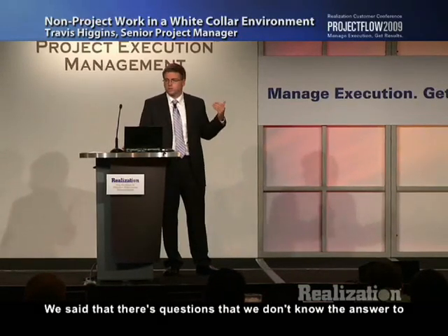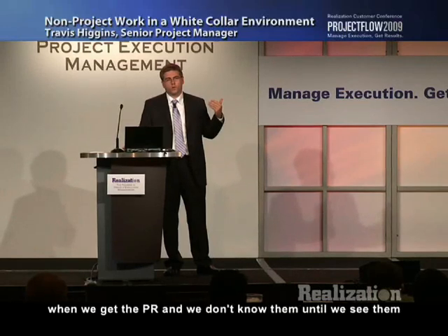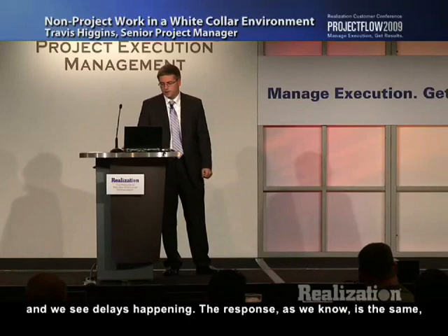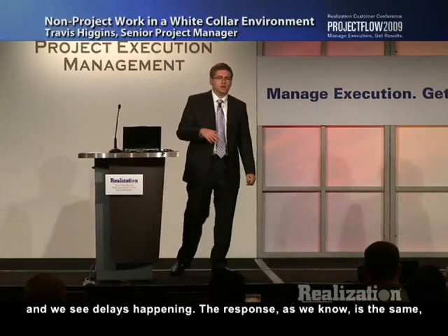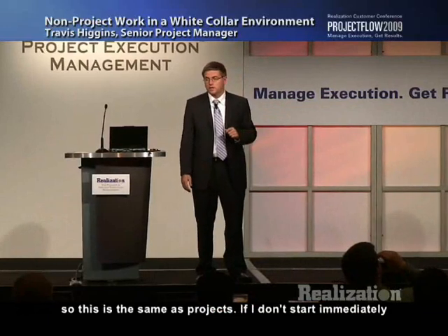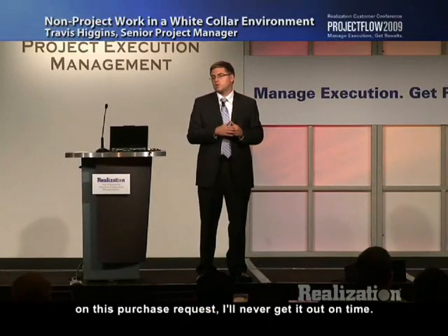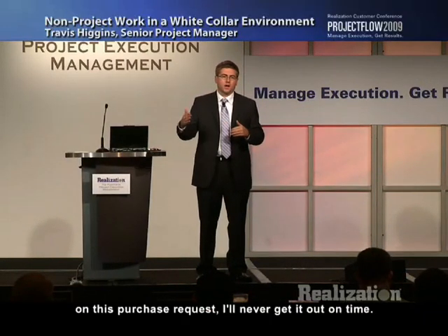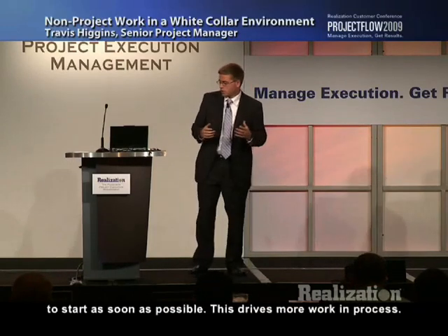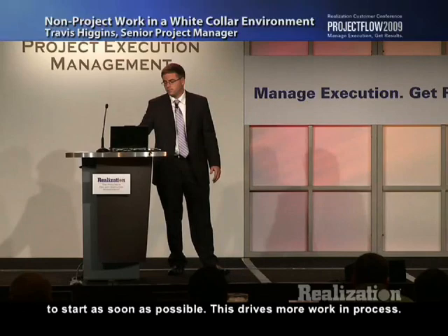We said that there's questions that we don't know the answer to when we get the PR, and we don't know them until we see them, and we see delays happening. The response, as we know, is the same, so this is the same as projects. If I don't start immediately on this purchase request, I'll never get it out on time, and that applies to all purchase requests. So there's a high pressure to start as soon as possible.